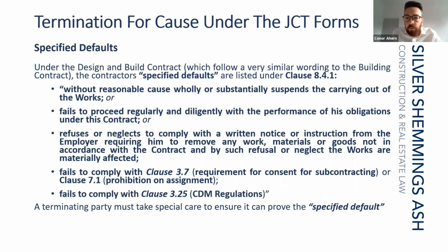So that's usually a clear one, because the employer in his default notice will specify exactly what he believes to be any work that is not in accordance with the contract. And obviously the contractor needs to act quickly on that, because if he fails to action it within the 14 days, or at least respond to the employer, then he's going to be at risk of termination and the losses that follow, which will include, as I said earlier, the additional cost to the employer for employing another contractor in his place.